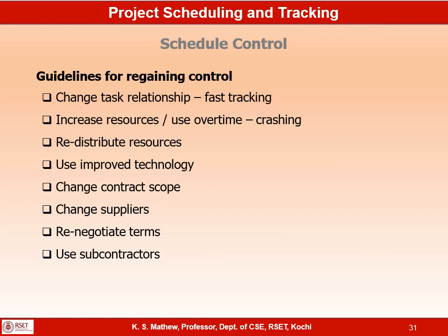Redistribute resources. The schedule slippage normally happens when there is a slippage in one of the activities on the critical path. If there is a slippage on the non-critical path, the project end date may not get slipped if the slippage is within the float available.